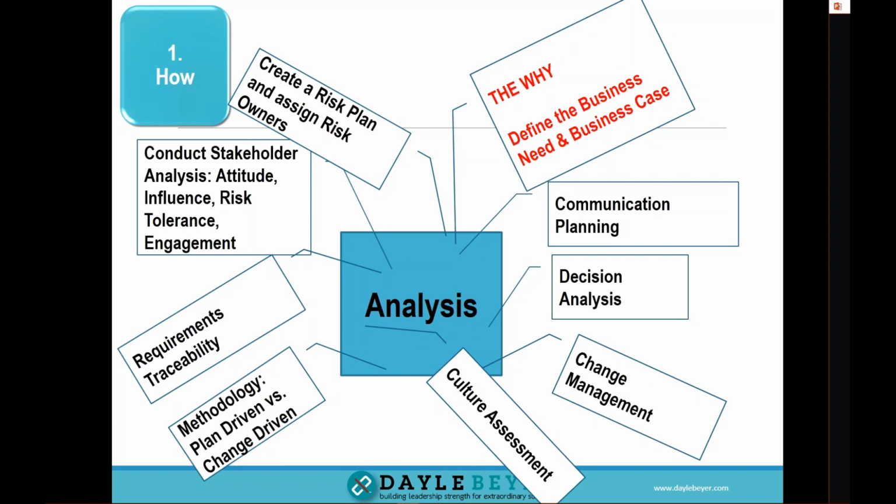So ideally, if you are trying to prevent as many problems as can happen before time, you want to be able to have a role called a risk owner. Someone who's constantly looking for how can we prevent problems before they happen. If you have any kinds of status meetings and you're focusing on percent complete, that's old school. You want to be able to say, what are we doing to prevent problems in the future? That should be the number one thing on your agenda.